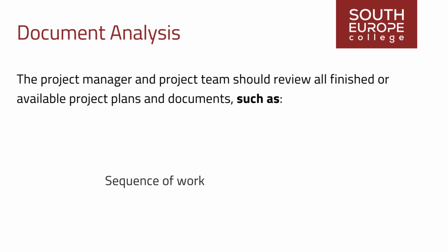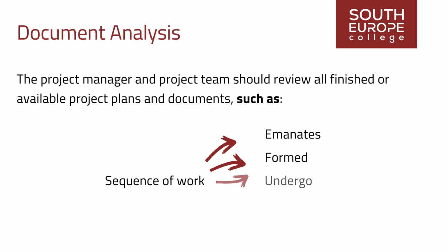Sequence of work. Risk emanates from interdependencies and the consequential sequence of work. Particularly noteworthy are the critical path and external dependencies formed through resource sharing with other projects. Should the critical path undergo alterations throughout the project lifecycle, the dynamic nature of the criticality associated with risks related to the elements on that critical path must also be acknowledged and managed accordingly.